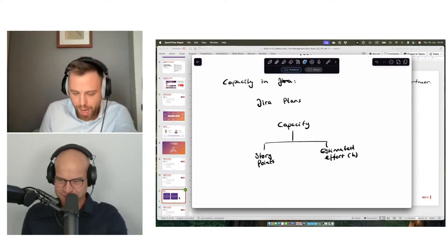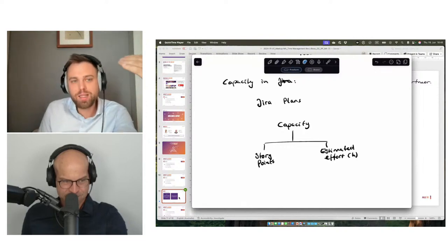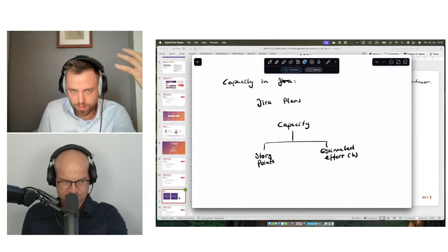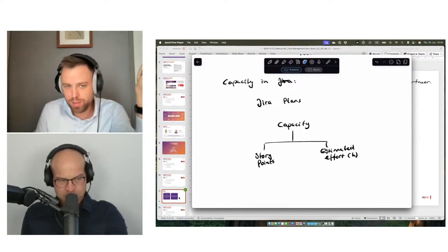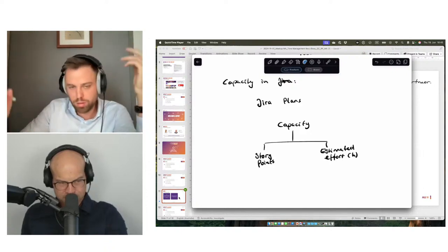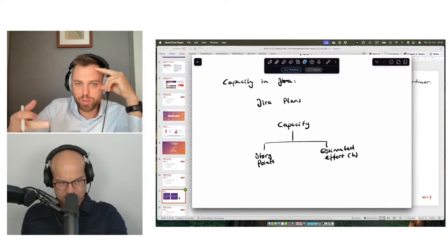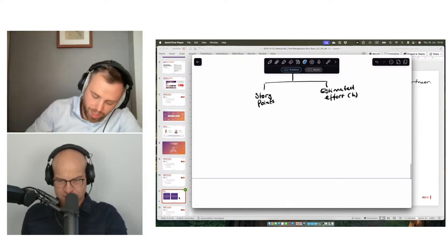So every task you're going to plan up front needs to have some sort of estimated effort assigned, either in story points or hours. There is a field for that, the story point field in Jira, or the estimated effort for the hourly rate. How many hours do I need to fulfill tasks A, B, and C? And what then happens? You estimate your tasks.